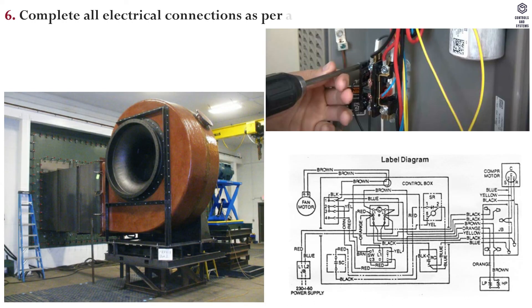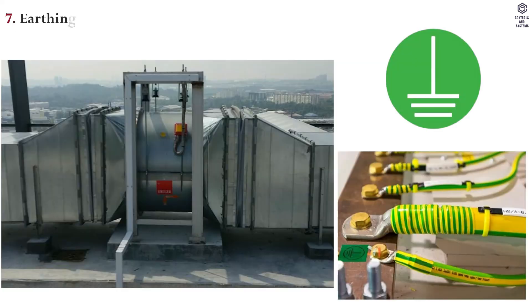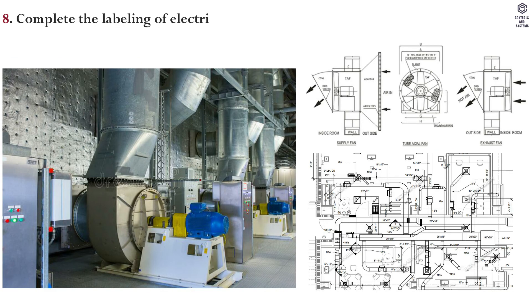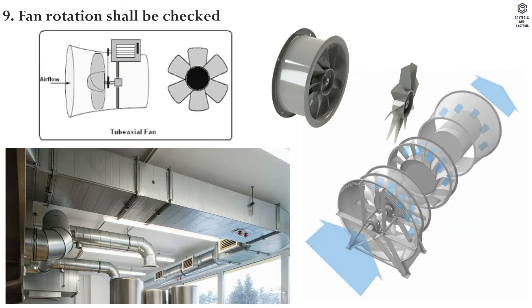6. Complete all electrical connections as per approved electrical drawing and manufacturer's terminal diagram. 7. Earthing shall be provided as per requirements. 8. Complete the labeling of electrical connections as per schematic drawings. 9. Fan rotation shall be checked before duct connection.